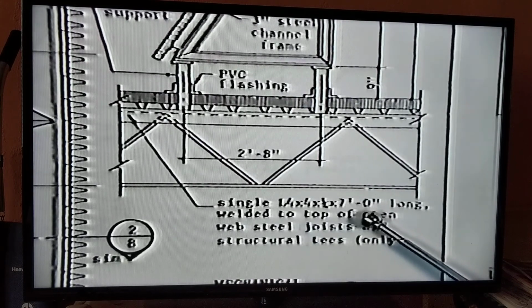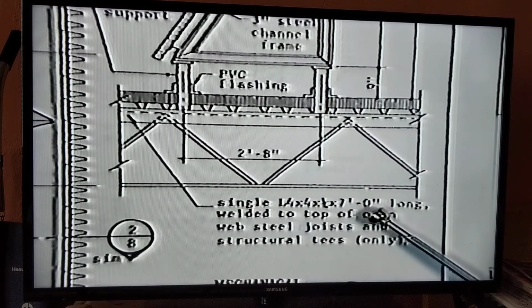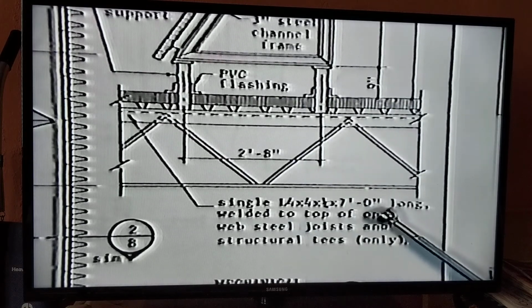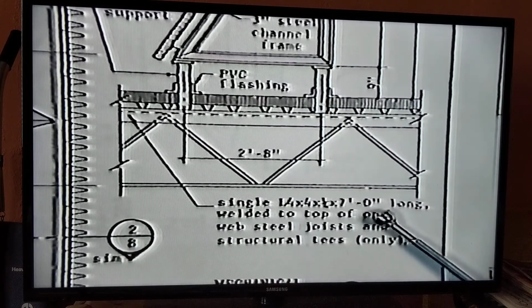If you remember from prior modules, there is information about angle iron in Walker's. And you can look up this piece of angle iron and find out how much it weighed per lineal foot. That times 7 will tell you how much each angle weighs. And you might be asked a question for the total weight of all such angles.